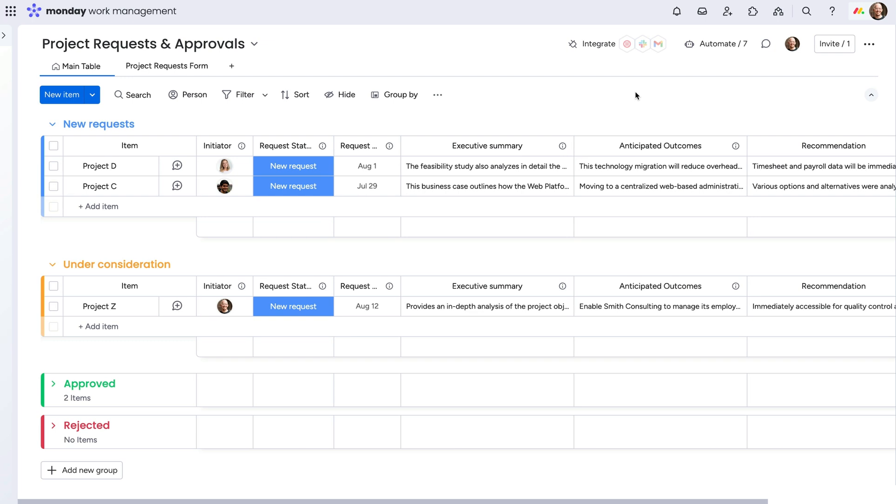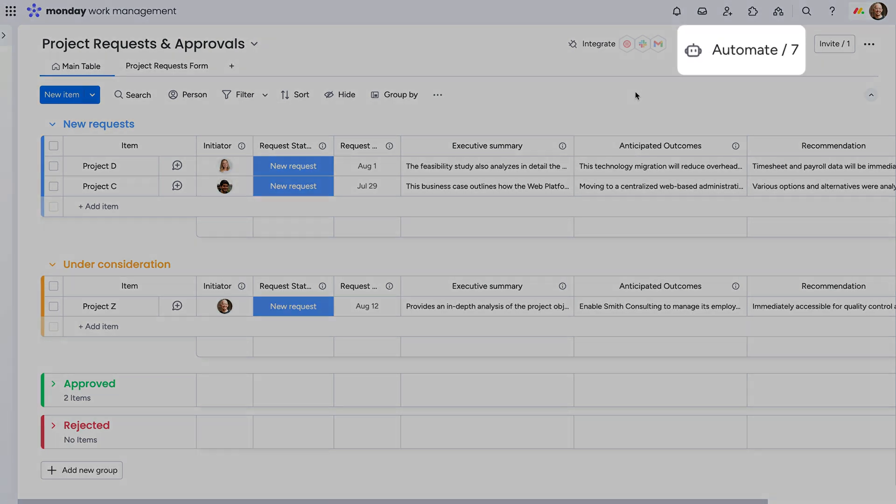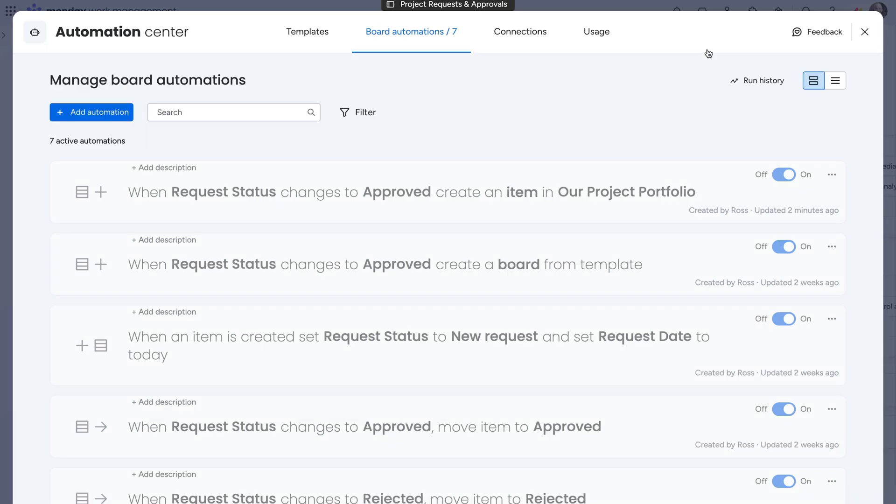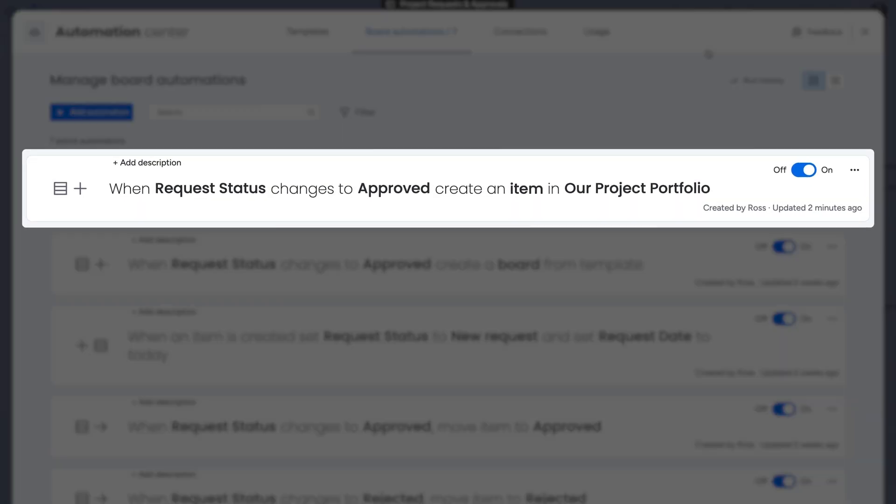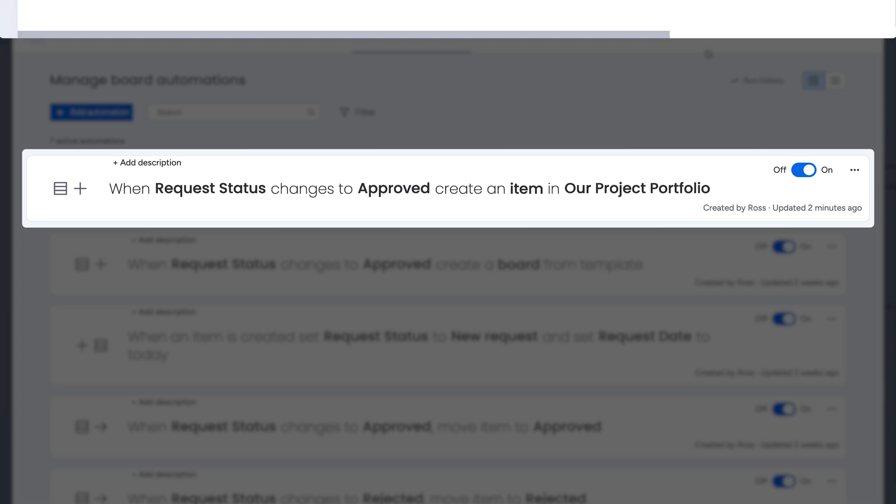You can save even more time by adding projects to the portfolio with a set of automations. Back on the request board, we can add an automation here to create a new item on the portfolio board once a project is approved.